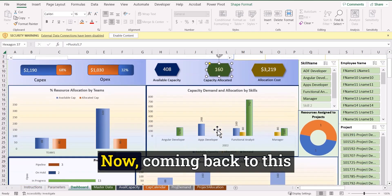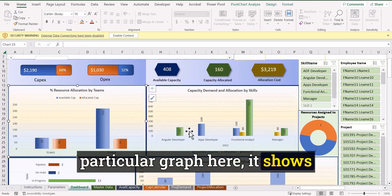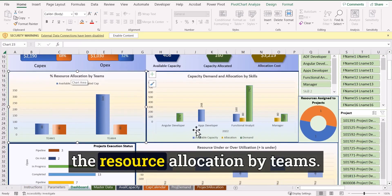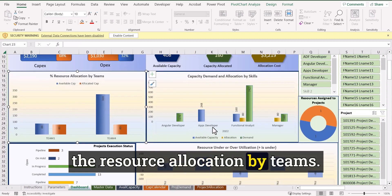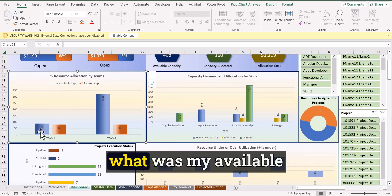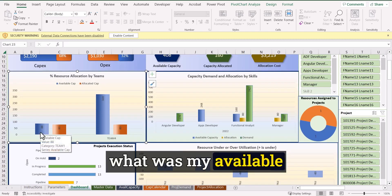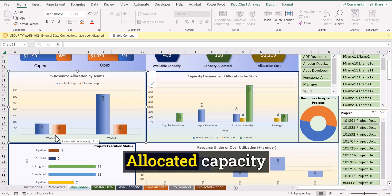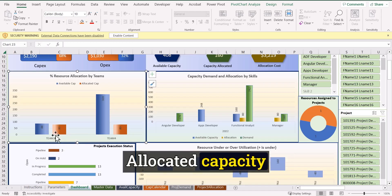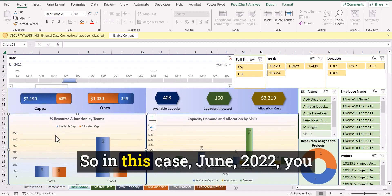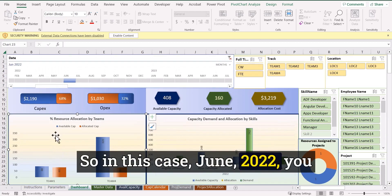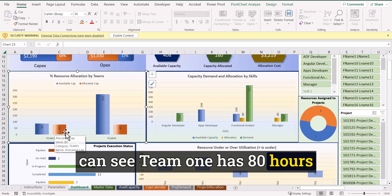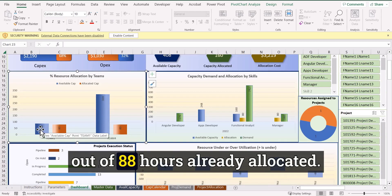Now coming back to this particular graph here, it shows the resource allocation by teams. That means for each team, what was my available capacity and what is my allocated capacity for that time frame. So in this case, June 2022, you can see team one has 80 hours out of 88 hours allocated.